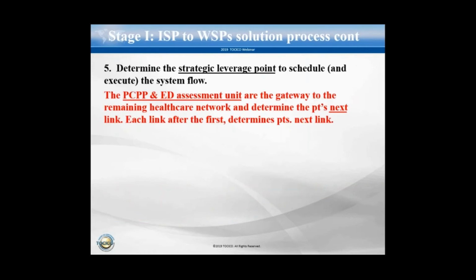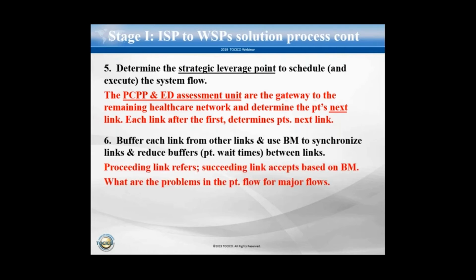The strategic leverage point. Determine that. As I said, that's the primary care provider and the emergency department, because they start the whole process. And each of those links determines what the next link is. Where should the patient go from here? We buffer between the links, and we use buffer management to reduce that buffer, which is the wait time, and to synchronize across the entities.